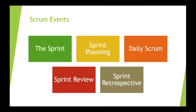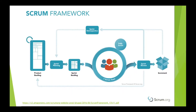The Scrum framework defines five events, which together represent the increment. The sprint is a container for the other four events. A sprint begins with sprint planning, with a daily scrum occurring each day, ending with a sprint review, followed by the sprint retrospective.